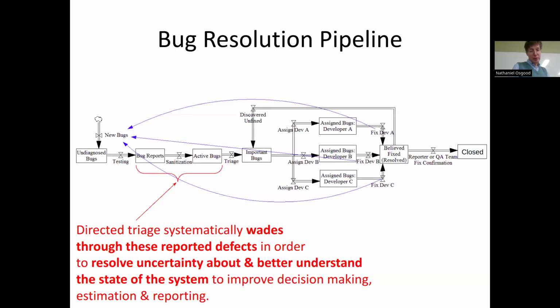Fault feedback ratio. This is a key one, I mean, one of which Randall spoke, and prescient. Attempted defect fixes sometimes breed new defects. And organizations will sometimes track this, like how many fixed defects end up producing a new defect coming from that fix.